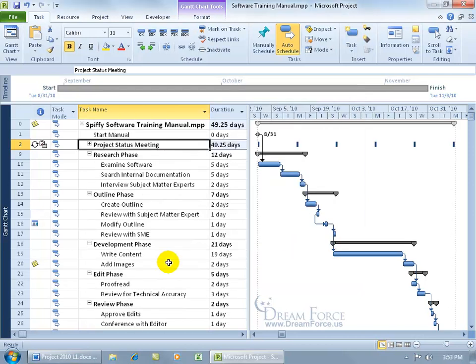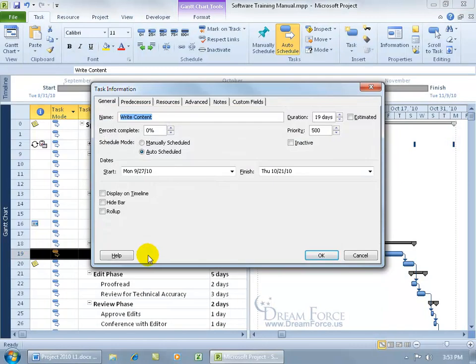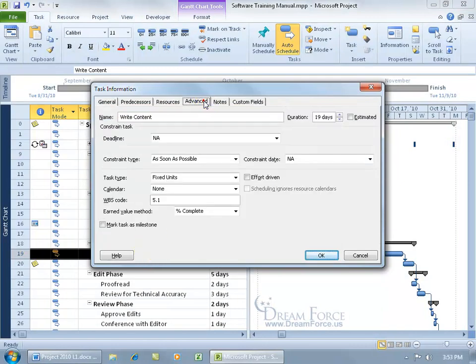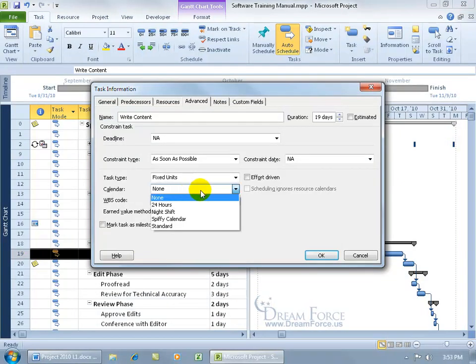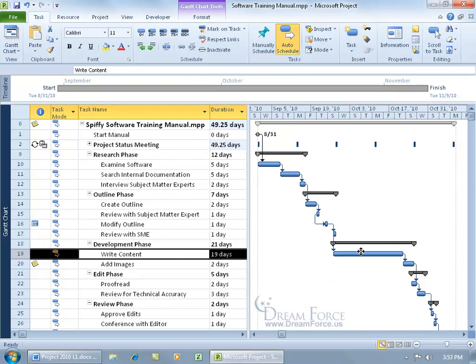And when you create the calendar to assign it to a task, you can double click on the task, come up here, click on the advanced tab, and go ahead and change it from none to that task calendar, if that task has something that it needs to adhere to, and the reason why you're creating that task calendar. But I digress, that's getting ahead of myself. Let's click cancel.